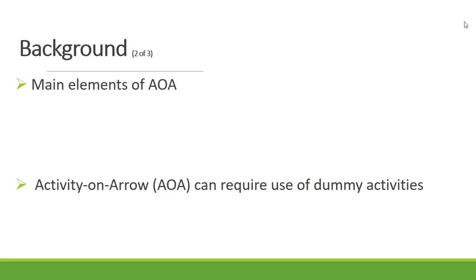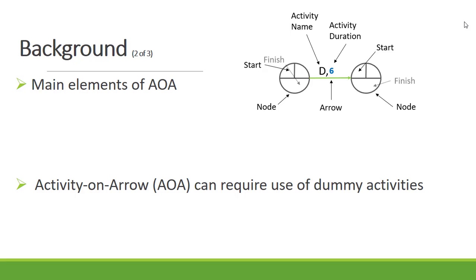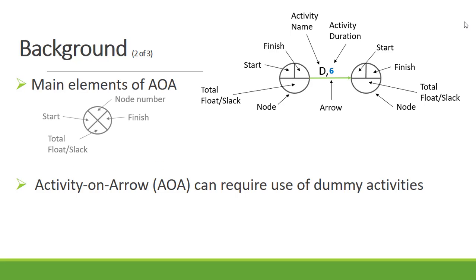The main elements of the activity on arrow are the arrow, where we indicate the activity name and the activity duration. The activities are linked with nodes, and on the nodes we normally indicate the start time, the finish time of the node, and then the finish minus start is used to calculate our total float and slack. In some instances, we can also use a node divided into four segments, where we also indicate the node number.